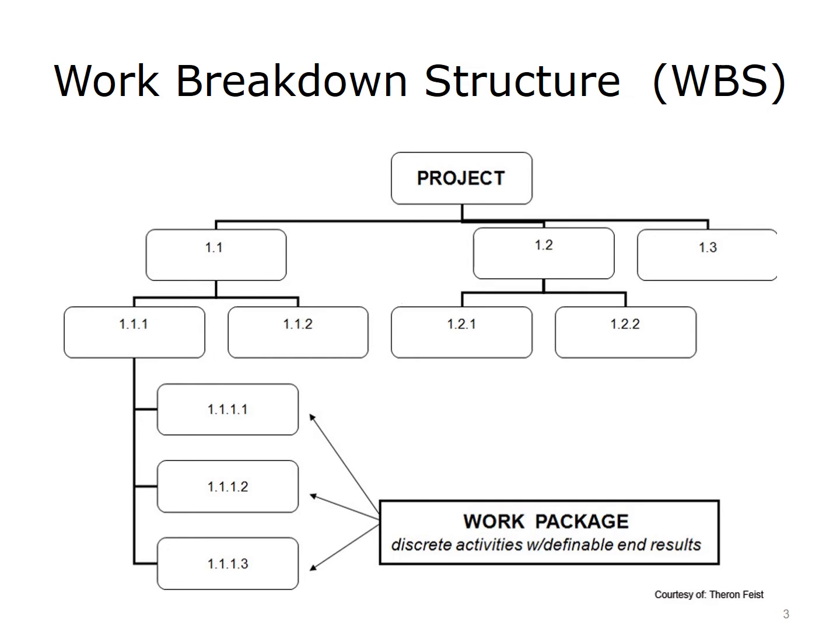The project manager should break the work down until a realistic chunk of work, or a deliverable, is reached that can be scheduled, assigned to be performed, cost estimated, monitored, and controlled. The key outputs of the WBS process are the WBS itself, the WBS dictionary, and the scope baseline.